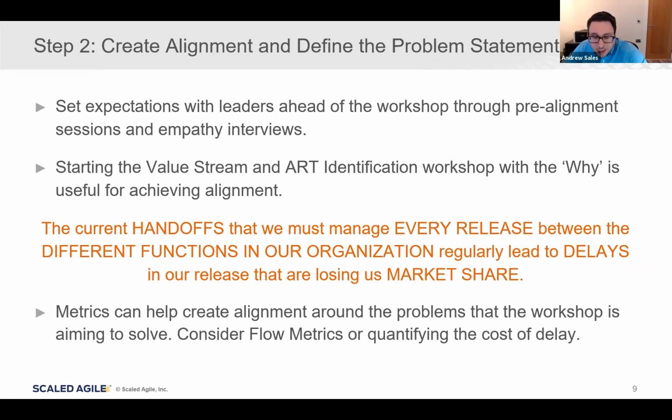The other thing that you're going to need going into the workshop is a recognition that there is a problem to be solved. Otherwise, you often come up against the claim that there's nothing wrong with the current way we do things. And to that end, having a well-defined problem statement that specifies the what, the when, the where, and the impact, like the one on this slide, can be really useful to mitigate this and actually get agreement to the fact there's a problem to solve ahead of time.